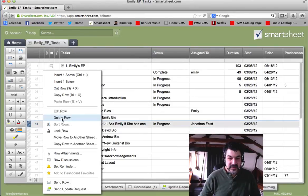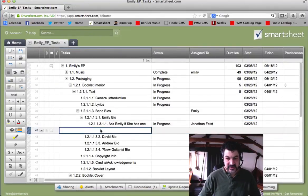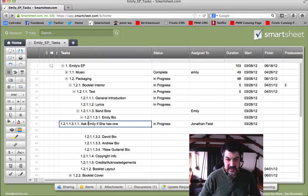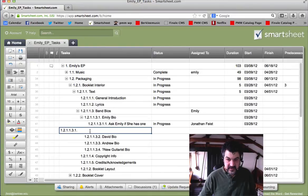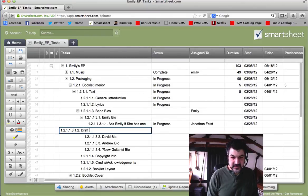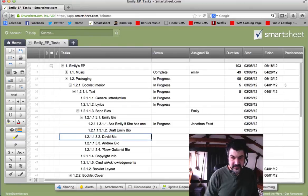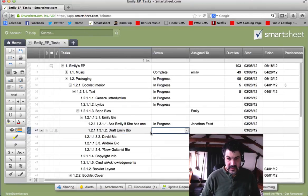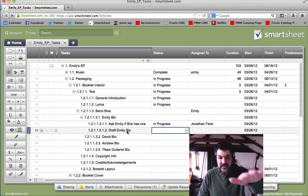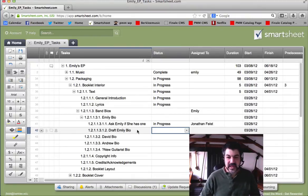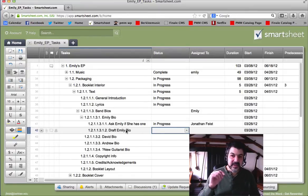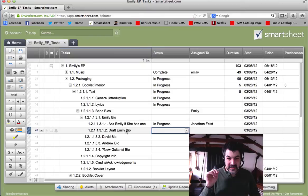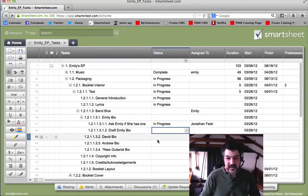And then as we go, when I do that, well, maybe she doesn't have one, so she asked me to draft one for her instead. So now we have a new task. I can actually just cut and paste these numbers. So this would be task number two at this level. So then the next thing I do is draft Emily bio. And so we gradually come up with a series of tasks. So after I draft it, maybe I add a task to have Emily review it and give me feedback. And then I get another one for her to approve it. And then I can move on to the David one.